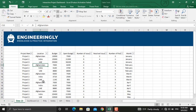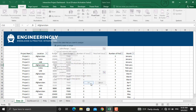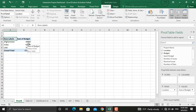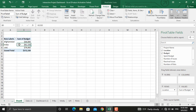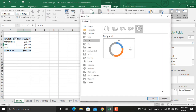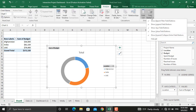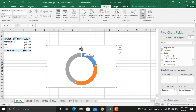Our last chart will be a donut chart which will represent the amount of budget per location. Go to Insert, then Pivot Table, and insert a new pivot table in a new worksheet. Select the location and the budget, convert these values into currency from number format — select currency, remove the decimal places, and click OK. For this one, insert a donut chart from Pivot Chart — click the pie chart option, select the donut, and click OK. The first thing is to remove the field buttons, the title, and everything from our charts — go to Analyze, click Field Buttons, and hide them all. You can also remove the legend and the chart title.